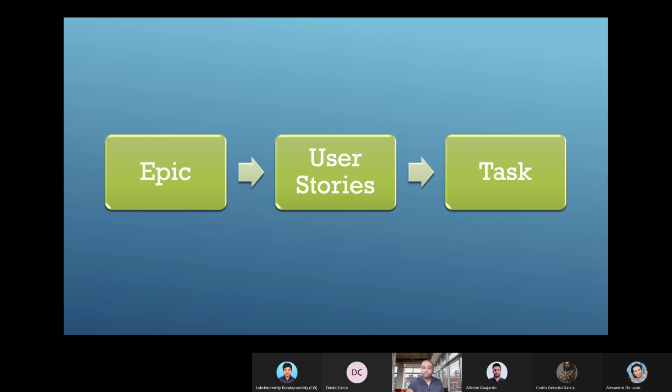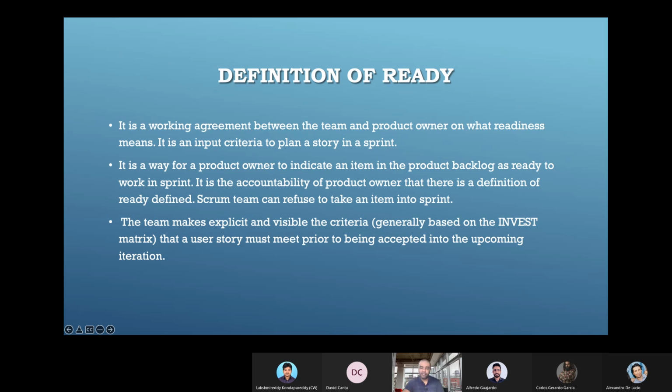and then it's difficult to deliver, and that is the loophole how the scope creep and the project creep happens. But here, whenever the product owner is going to decide, he will have epics first, and then the product owner is going to break the epics down further into user stories, and those epics or user stories will come into the product backlog. And finally, within the user stories, he will break it down into sub stories or tasks, and the task can be further broken down into subtasks. So this is how the entire breaking down of things will be done.